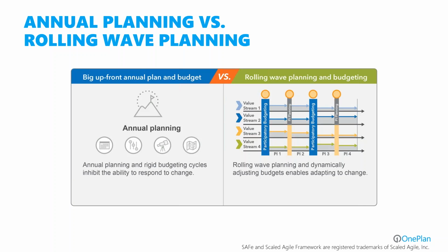And then the other part of the cadence recommended is to have quarterly events called PI planning, program increment planning. The way to think about quarterly events is that's an opportunity to get this value stream behavior and mindset working by getting people together who otherwise might not be collaborating, breaking down those silos, and using that quarterly event, even if it's just for a couple of days.